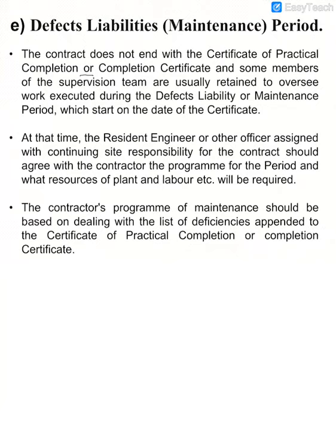At that time, the resident engineer or other officer assigned with continuing site responsibility for the contract should agree with the contractor's program for the period, and the resources of plant and labor that will be required. The contractor's program of maintenance should be based on dealing with the list of deficiencies appended to the certificate of practical completion.